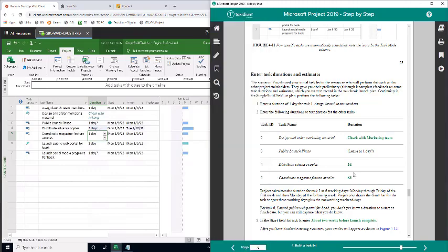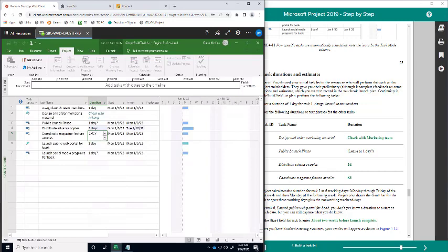Okay, now for step number 2, but task ID number 5, I have to change this to coordinate with feature. Okay, we'll have to do 6 days, right? Again, we'll do the same trick. There's a number of ways you can do this, right? So either you can just go up here, so 3, 4, 5, 6 days, or you can do 6D. Okay, and then enter.